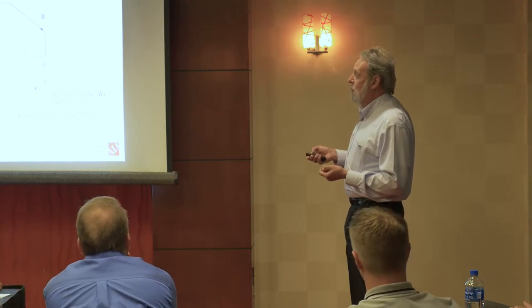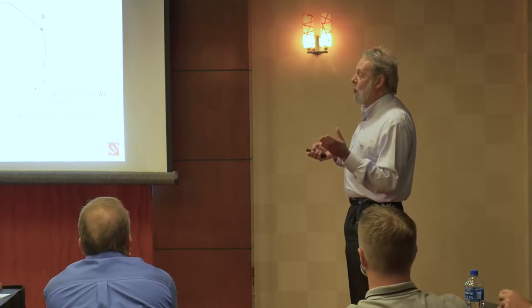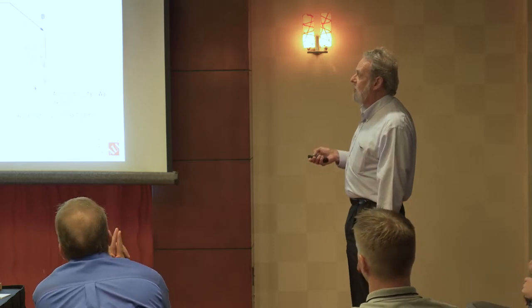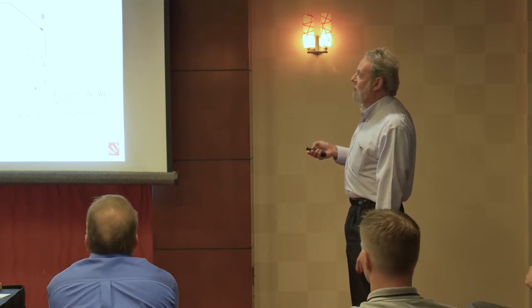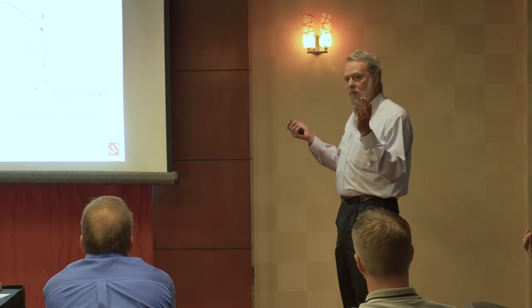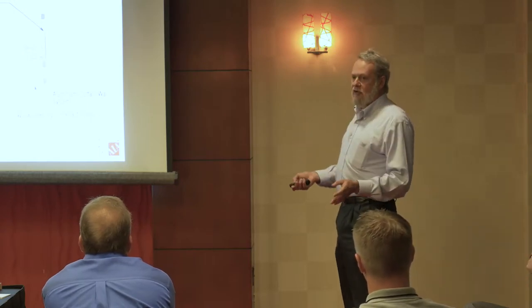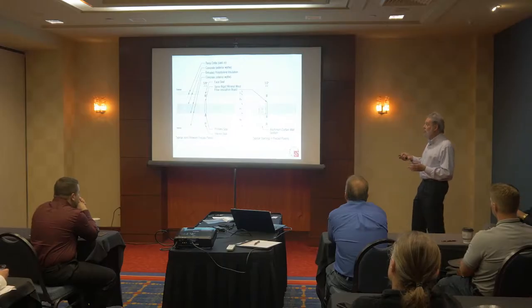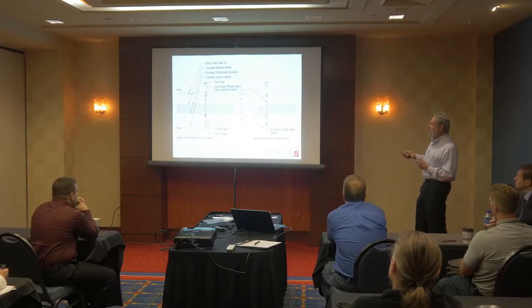So they set the panel, put that joint in. The opaque envelope is completely finished in terms of weatherability. Cosmetic seal here, the inside's done. Put this insulation in and this seal and walk away. That's it, building envelope's done. And they loved that because think how fast they were going to be able to get the building enclosed and how little time they'd have to put into it. I'll talk a little bit more about glazing in a second.